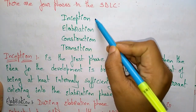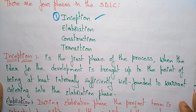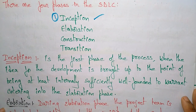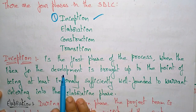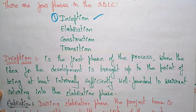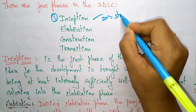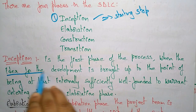Inception is the first phase of the software development life cycle. This is the first phase of the process when the idea for development is brought up to the point of being at least internally sufficiently well-founded to warrant entering into the Elaboration phase. In inception, the starting step is to gather all internal information sufficient for moving forward.